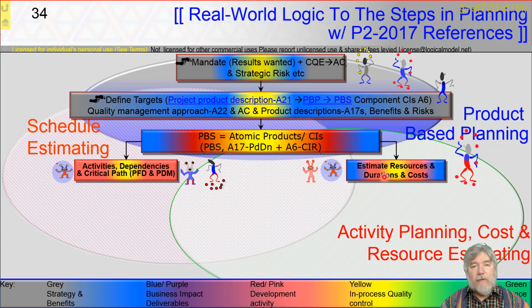So there might be some divergence around how the different approaches consider we get reliable estimating, but they all say something along the lines of, once we understand the activities and the skill sets and the number of people with those skill sets and the amount of resources, we can get some durations. And if we combine duration with dependency, then we can get some view about what this looks like in relation to the calendar, which we could then call a schedule. And in some environments we might then model that with a critical path analysis using things like a Gantt chart.